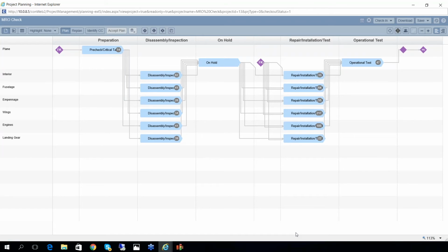When we originally implemented critical chain, before we did that, the project plan was these 700 tasks, which was totally unmanageable. When we implemented critical chain the first time around, we reduced this number of tasks to about 75, which was a massive simplification. But even then, what we found was not really a user-friendly project plan, and even that was pretty unstable. Now with this two-tier concept, we have collapsed this project plan into about 15 tasks.